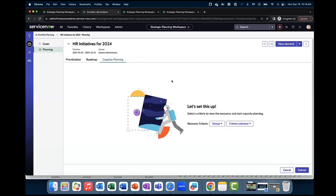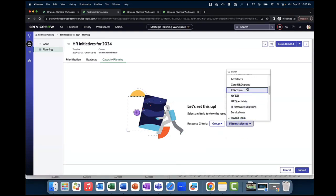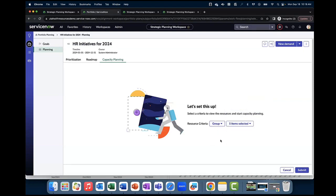Next, portfolio managers can determine the relevant criteria that resources need to complete the work in a portfolio. They can first define the criteria by group, role, or skill, and then select all of the relevant fields related to the criteria previously selected. This reduces confusion by filtering out irrelevant resources and also allows you to include resources from other groups or departments.